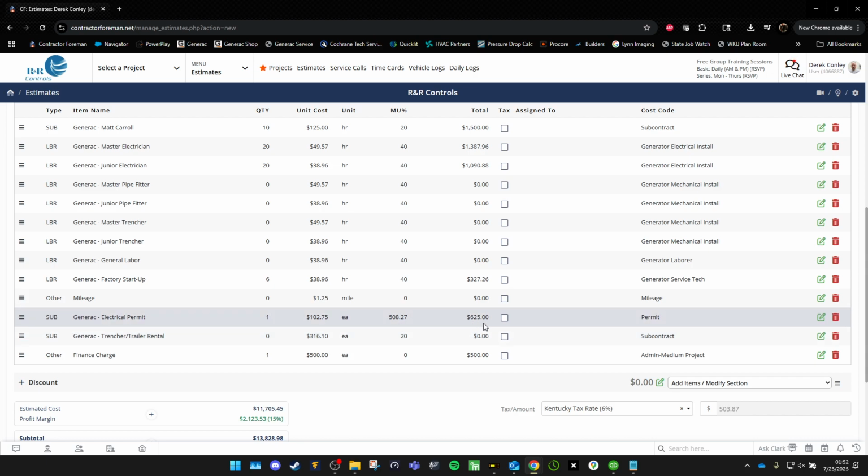Electrical permits. It's 102.75, but they've been going up. We do charge a 508.27% markup because some permits, some inspectors require us to come back numerous times. So, Teddy Webb, he shows up once, checks off, we're good. The guy in Bowling Green comes in, he wants to come in 2 or 3 times. So we mark it up this much to help cover some of our cost of sending somebody back out there.